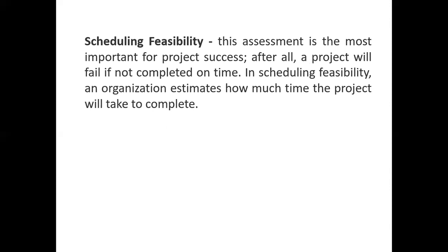For example, constructing roads. Of course, we know that rainy season is a bad time for road construction. So, of course, you cannot schedule to start a project in that season, right? So, according to scheduling feasibility, that will stop you from making such a great mistake.